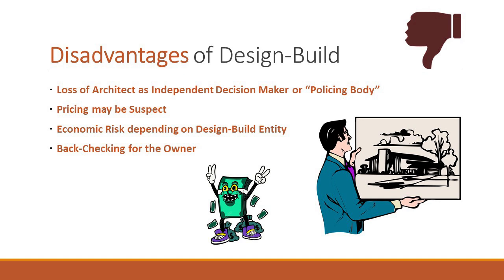We're actually doing that with this project that I've been talking about, that I'm working on this agreement. Our engineer is doing cost and quantity takeoffs. And when we go out to bid in 2 weeks with the 60% drawings, we have a pretty good ballpark from our engineer of what this project should cost.